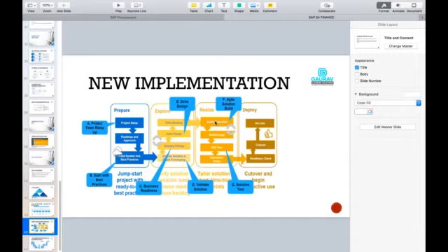It is not necessarily weekly. I'm just giving you an example. It can be every 15 days also. So let's say every 15 days I have a target. I will set up this, and once I set it up, I will have a walkthrough with the customer. Here it is. If there is anything wrong, it can be immediately resolved rather than waiting for 4 months.